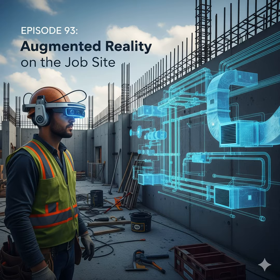That must make collaboration way easier, right? Because everyone, architects and engineers, contractors, work off the same super detailed master plan, not trying to match up different drawings. That's the core advantage, absolutely. This integrated, data-rich environment is key. The BIM handbook points out that BIM helps drive a shift towards more collaborative ways of working, less working in silos. Because everyone's using and adding to the same central model, you spot conflicts much, much earlier, during design, not during construction. And this model lets designers run all sorts of simulations. What-if scenarios. They can check impacts on energy efficiency, ADA compliance, spatial relationships, like Construction Management Jumpstart details.